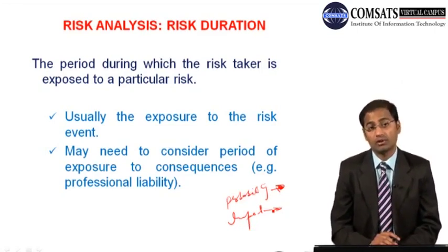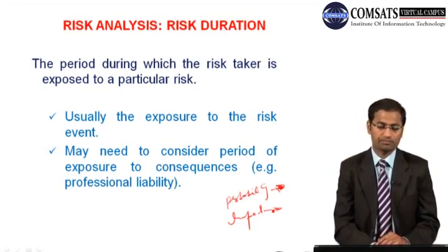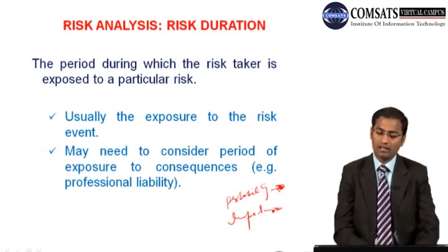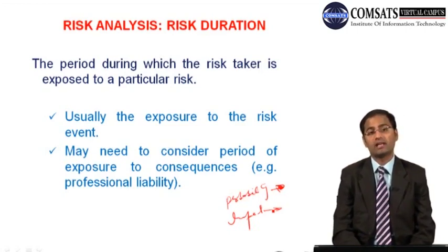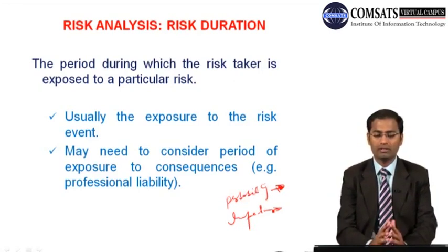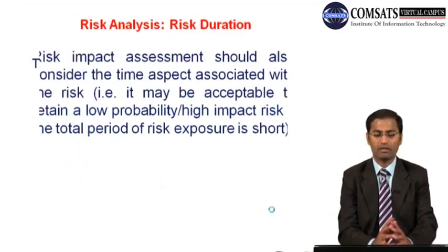Then we can use Monte Carlo simulation and sensitivity analysis for the understanding or calculation of the impact. And we have talked about that there are two more important characteristics of these risks. But many people are also of the opinion that the risk duration is very important. So the period during which the risk taker is exposed to a particular risk is very important. Usually the exposure to the risk event is not considered, and we may need to consider the period of exposure to the consequences. For example, professional liability.